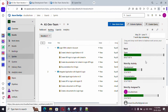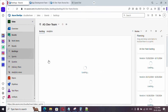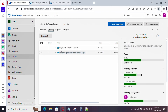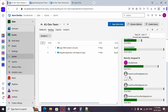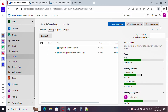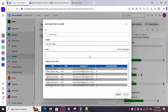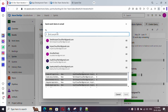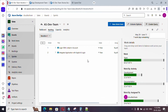The assignment is now more balanced but there are still unutilized resources. In that case, go to the backlog and pull out another user story into this sprint, then adjust the work among team members by changing the assignee. This is how the planning part works. Once everything is finalized, you can click Email and send a summary to the business stakeholders or the backlog owner describing what has been planned for this sprint. The member must be part of the project to receive the email. Planning is now done.